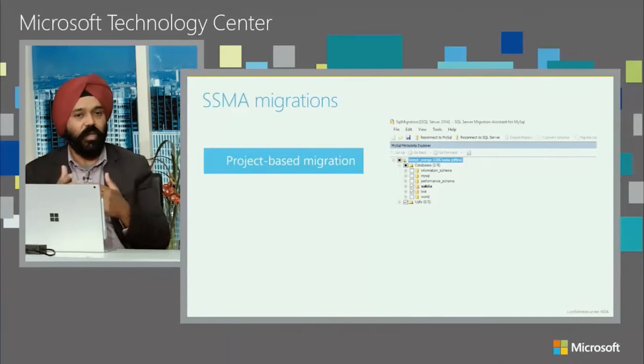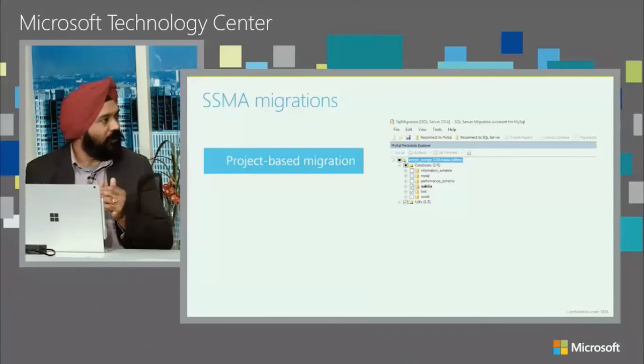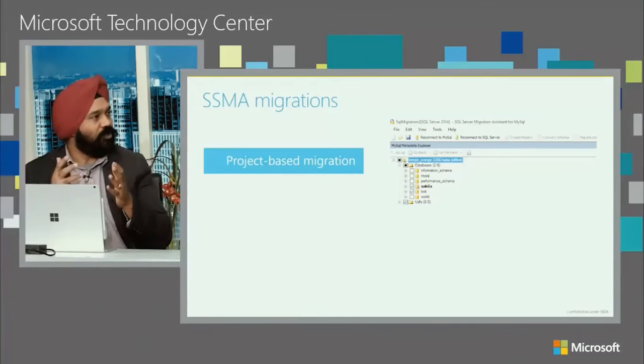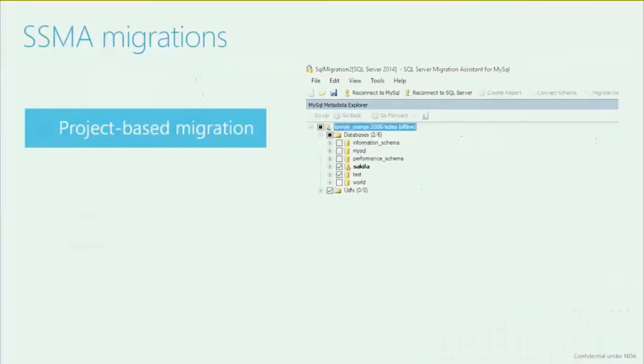Imagine if you have 100 Oracle applications that you're trying to migrate, right? Now each application migration is going to require different people from the application side, from the DBA side, from the infrastructure side to be involved. What you could do is create one project for all of the 100 migrations, which I wouldn't recommend. It doesn't make sense. Or you could make a project plan for each migration.